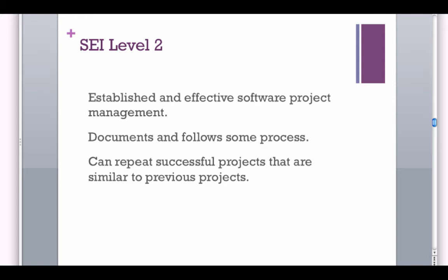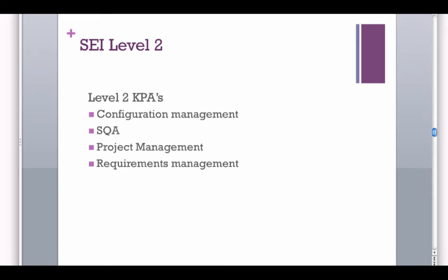Okay, so if Project X took 17,000 lines of code and 1 year with 4 engineers, and Product Y is very similar to X, you could probably plan on 4 engineers completing the similar project in about 1 year. Okay. So you're not really mature yet, but you at least have some idea of what's going on at that particular level.